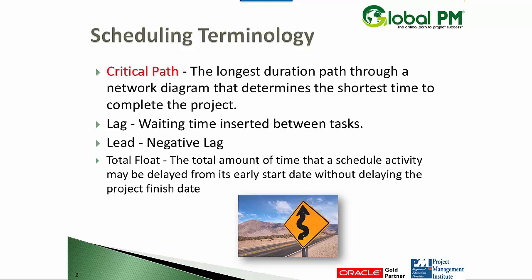For example, let's say you're building a home. Something like roofing might be considered critical. Why? Because if roofing is delayed, then obviously that's going to push out the end of the project. And so that's what I discuss in training classes. The question comes up: this activity is on my critical path, but it shouldn't be or vice versa. The question you need to ask yourself is, if it's delayed, is it going to push out the project's finish date? If the answer is yes, then it should be critical and reflected as so in your schedule.